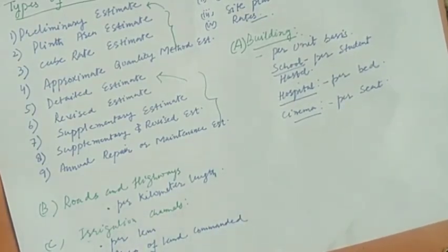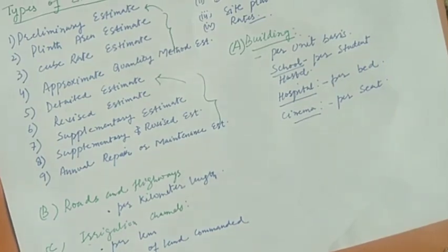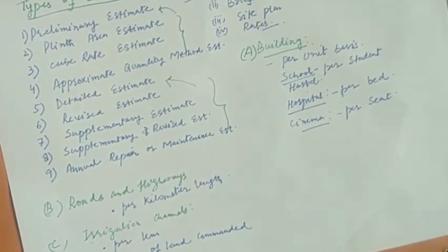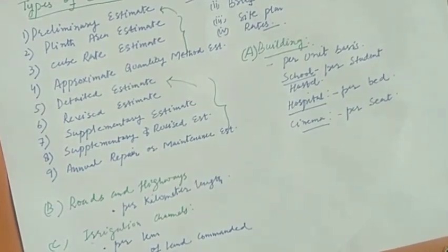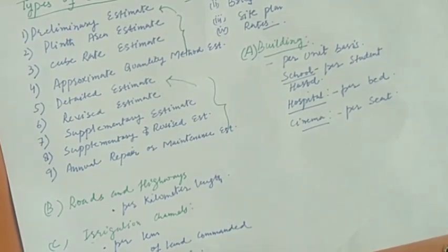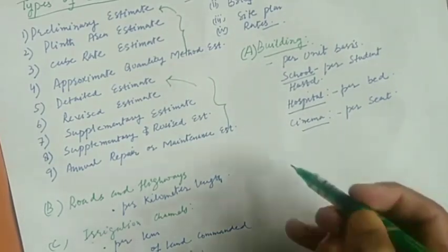Similarly, if we talk about bridges and culverts, it is prepared on the basis of per running meter of a span.